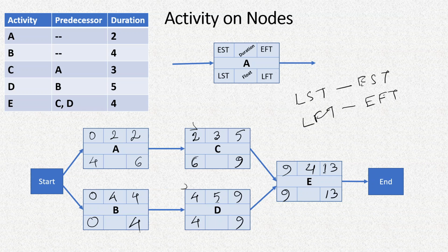So here if you want to write it, it is either 13 minus 13 or 9 minus 9, that's the same thing, so that is 0 here. In this case 9 minus 9 is again 0, or 4 minus 4, which is the same thing, and here also 4 minus 4 or 0 minus 0, which will give us only 0.